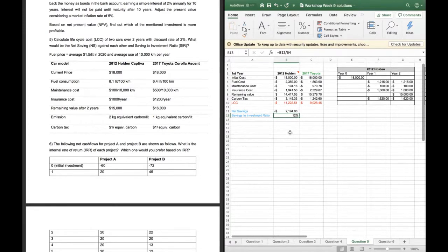So I plan to talk to Ali and Sauradip regarding that. And also, as I told, for finding savings to investment ratio, it is net savings divided by initial investment, right? So even for the net savings, do we subtract this from this or this from this? It will give us different values. And also, of course, as you mentioned, the denominator for both these situations can be different if we have different initial costs. That is what your question is, right? Or did I confuse you?